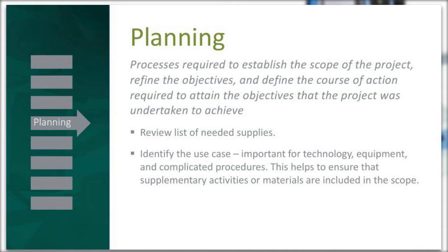Do you know where you're going to procure the items that are listed? Are you going to get them from a vendor, a manufacturer, a distributor? These are crucial things that you need to know. Will you have to worry about reporting any of these items? Now, when I say that, in the United States, of course, we have the Sunshine Act reporting, which is a very crucial, very important piece of reporting that you have to get done here in the United States. And Hope will talk about this later on. But what a lot of people don't know is outside of the country, there are also other reporting structures that have to be followed as well.